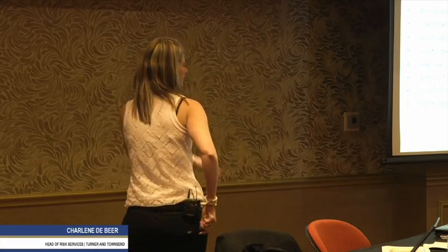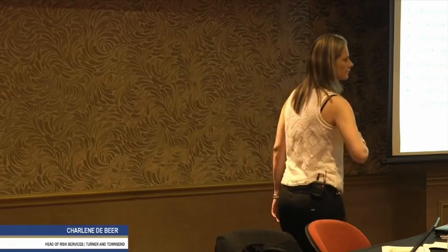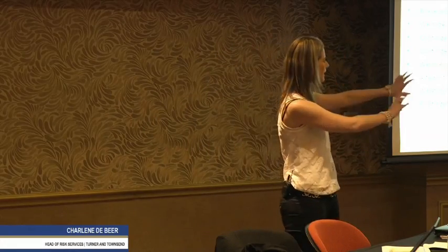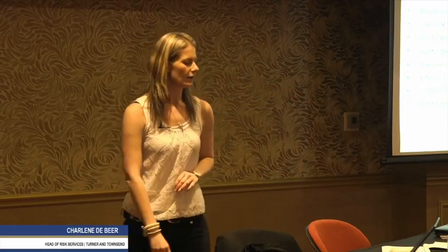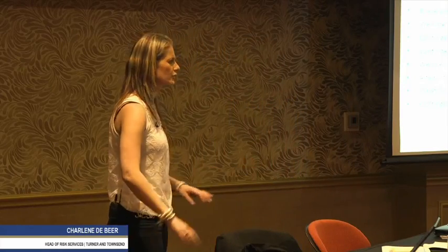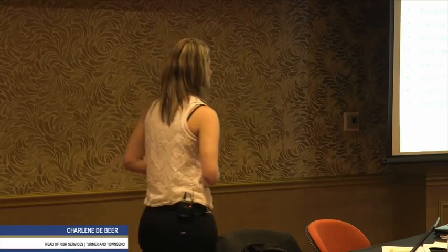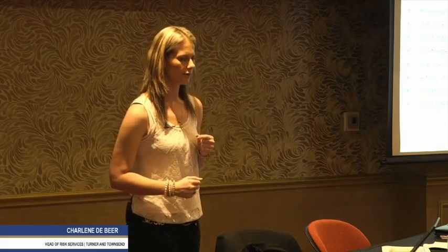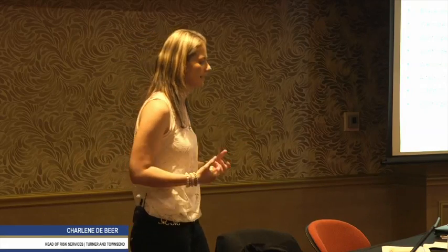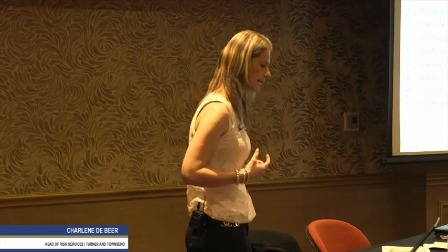So we've got 100 million there, and basically what they say is first come, first serve. Doesn't matter what happens, whether we identified it as a risk or whether it was built in at estimating phase, whatever happens, even if we have a social party, believe it or not, we will use the contingency for it because we have lots of project money. So it doesn't go for anything specific because that cost was never based on anything specific. So you don't know where to apply it and how to apply it and what's the logic behind it.